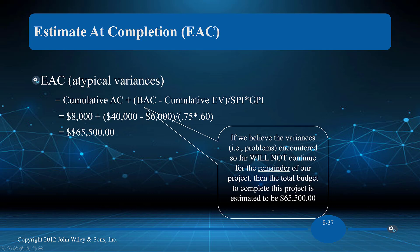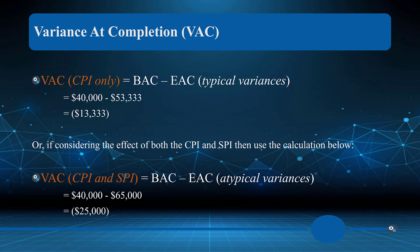For an atypical variance EAC, we divide by both the SPI and CPI together. Our CPI gives us 0.75 cents of value per dollar spent, while our SPI gives us 0.60 cents. Using the atypical formula, the project could end up at upwards of sixty-five thousand five hundred dollars. The variance at completion (VAC) shows we're thirteen thousand three hundred over using CPI alone, and twenty-five thousand over when combining CPI and SPI.